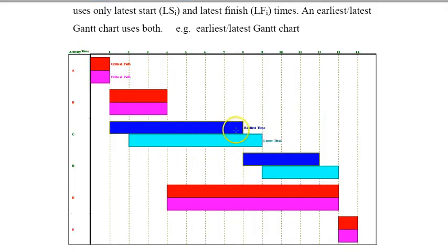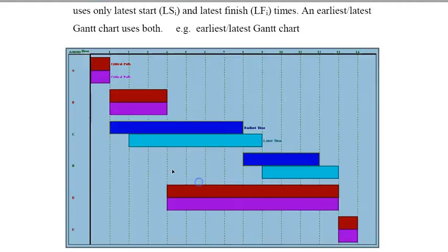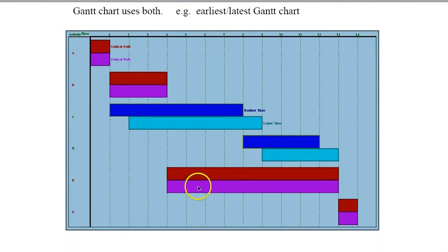And displaying these activities like this will help you with the management of the network. So as the dates go on, suppose you are here and you're looking at what has been done, so you know that 2 activities have been completed. You are in the middle of this activity and this activity, and there will be 2 more activities to complete. Also, you can tell the slack for each activity, which ones are critical, which ones are not, by just a simple graphical display. Okay.